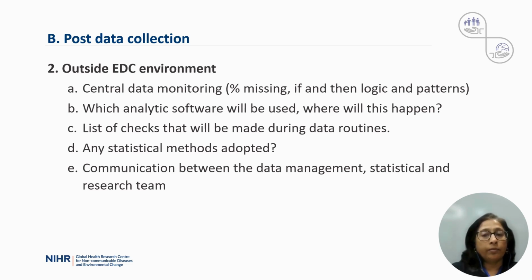And you can also look at patterns. As I discussed last time, if you have multiple sites, you can look at data patterns. And all this information can be done centrally by one data manager or a data analyst. And that's why it's called central data monitoring. It's not done at the field level.